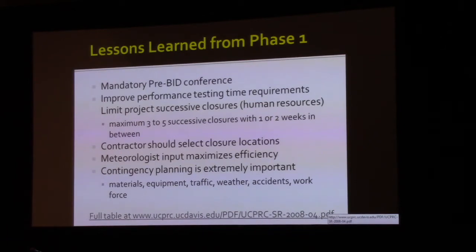Mandatory pre-bid conference. This is huge. This is part of that communication. Before a contractor even bids on it and puts a number down, they need to make sure that they know exactly what they're dealing with, both the pluses and the minuses. Also, it gives the last chance for the owner to get feedback. Is there something that they missed that the contractor may have found as they start to look through the actual plans and specs? That's where a pre-bid conference comes into play.